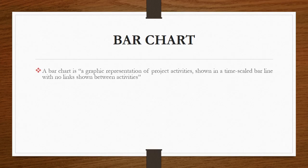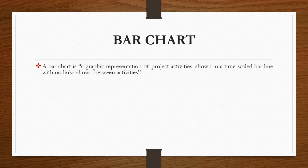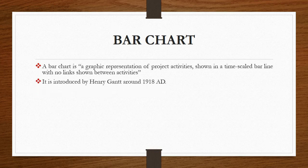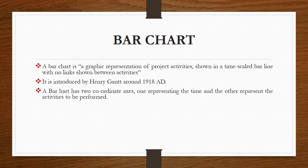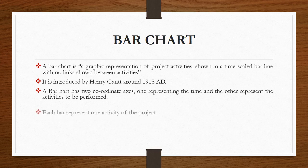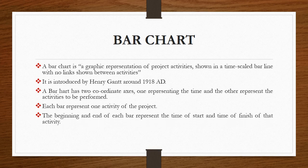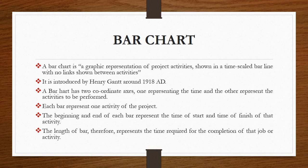Bar Chart. A bar chart is a graphical representation of project activities shown in a time scaled bar line with no links shown between the activities. It is introduced by Henry Gantt around 1918 AD. A bar chart has two coordinate axes, one representing the time and the other represents the activities to be performed. Each bar represents one activity of the project. The beginning and end of each bar represents the time of start and time of finish of that particular activity. The length of bar therefore represents the time required for the completion of that job or activity.